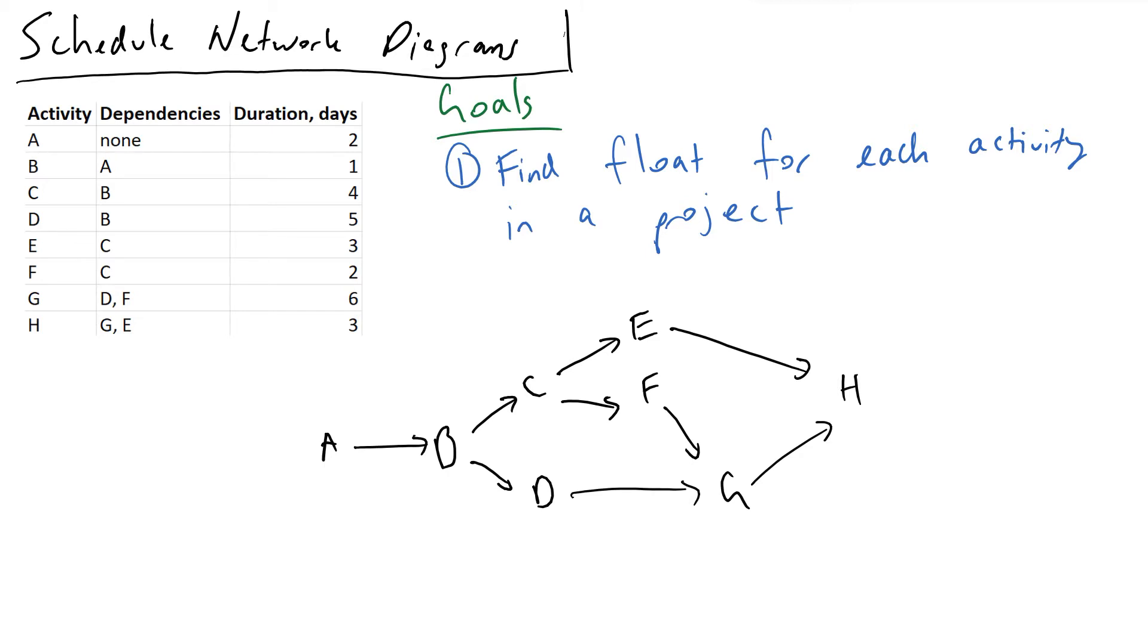Float is this thing that defines how much room you have to delay a particular activity within your project and still not affect your overall project's deadline. So in this case, we've already gone through in a previous video